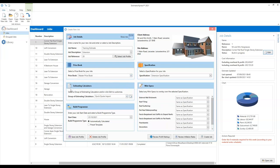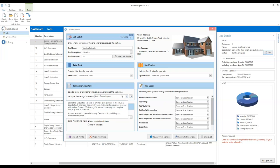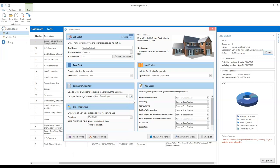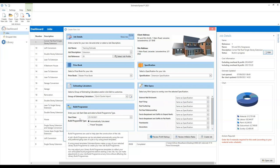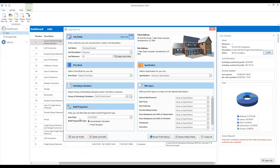With estimating calculators, you don't need to do anything there — the software is selecting the estimating calculators you'll need for the template you've just selected. It will also add in a load of preliminary and subcontract estimating calculators so you can add any extras not included in the template. You do need to think about the project start date. Often you're not going to know this at the outset, so just put an approximate start date in to start with, and then go into your build program and tweak the start date once you have a more concrete date.